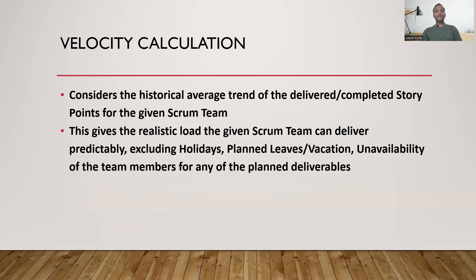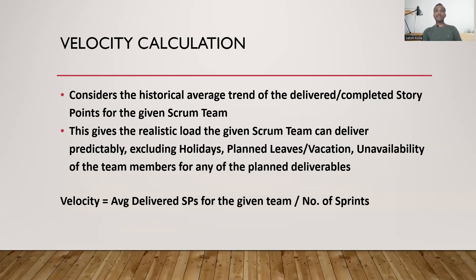This helps the team to plan a realistic load and provides predictability for the business team — including product owners, product management, or leadership — to figure out how much the team can handle, focus on, and commit in upcoming sprints or from the SAFe perspective, in the upcoming Program Increment. The velocity formula is: average delivered story points of the given team divided by the number of sprints. We need to consider the latest sprints' historical data, not the initial sprints.